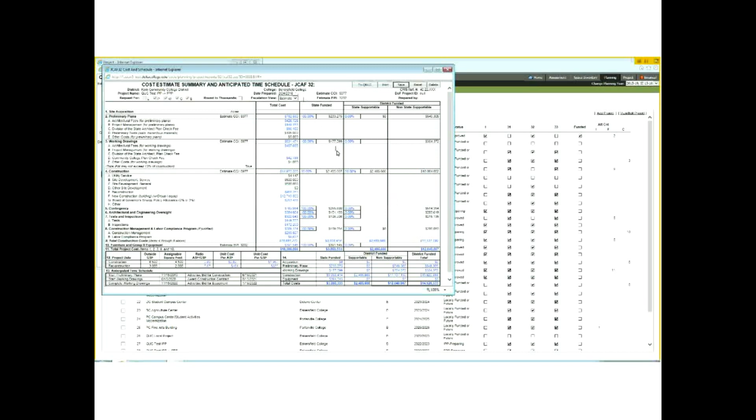And so as you adjust, you can see what your costs are in an estimate. And then if you wanted to adjust to see what your costs would be at the midpoint, selecting the midpoint escalation view will allow you to see that. We'll also round, just to make it a little simpler, to the thousands. So in an event, you can determine what your budget actually is, or could be, in the future.